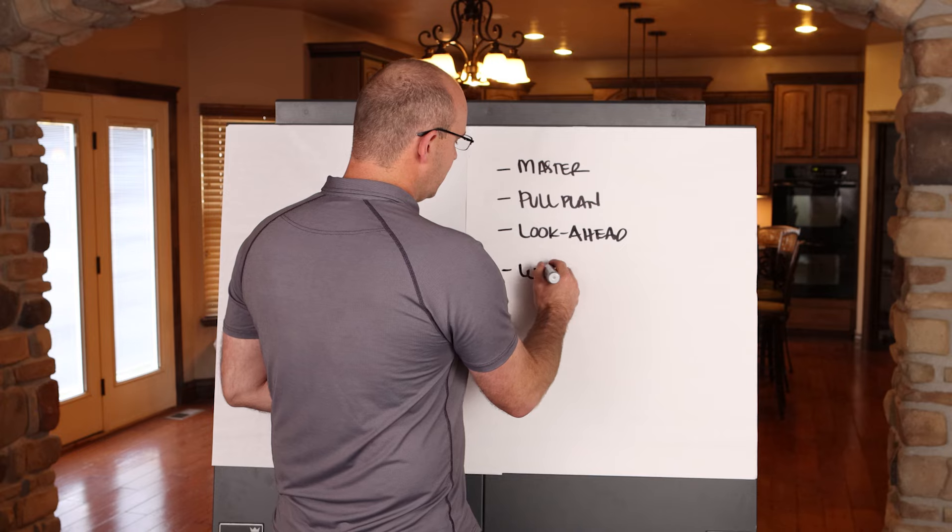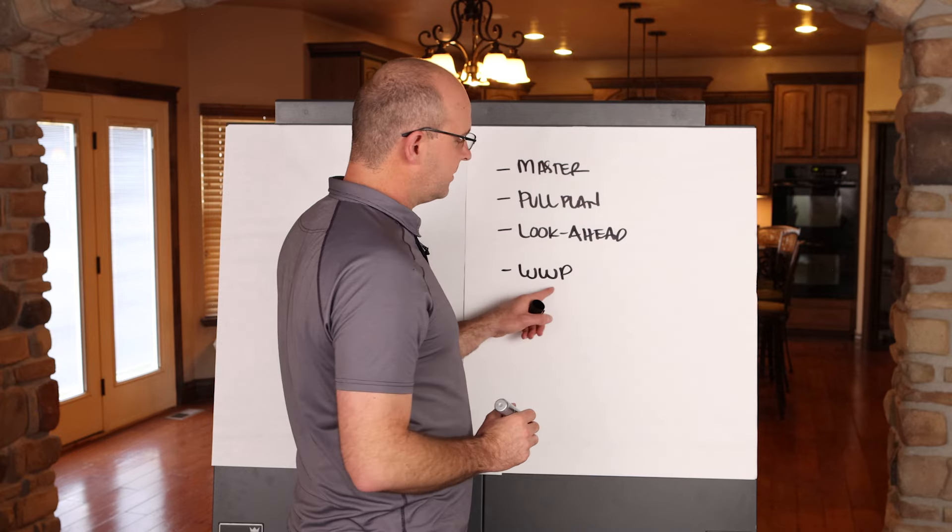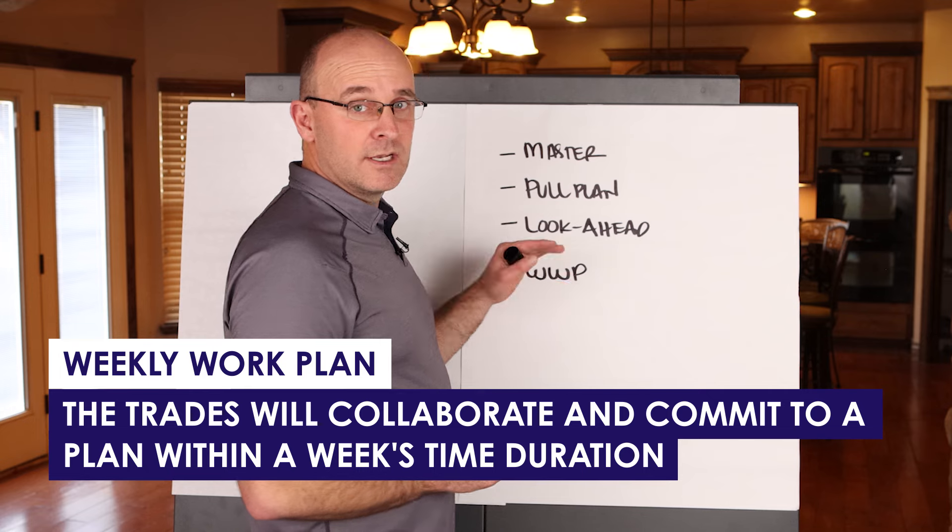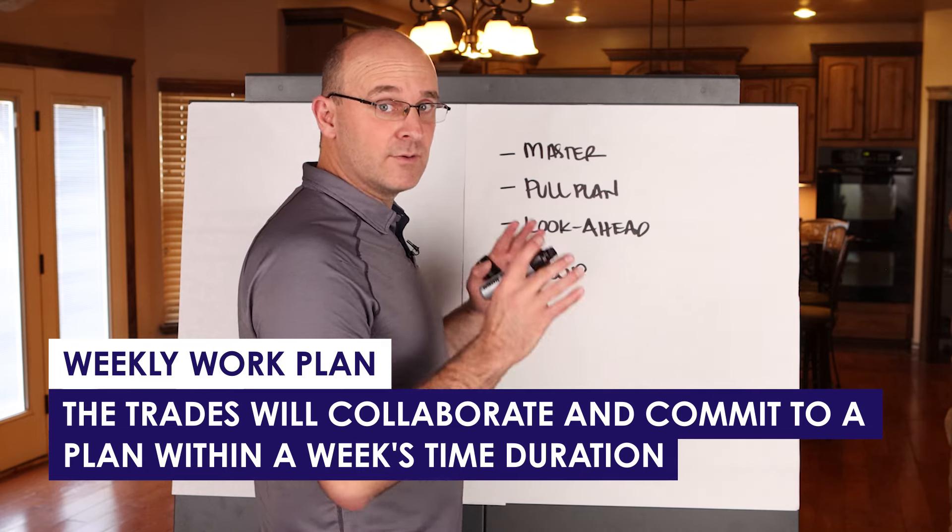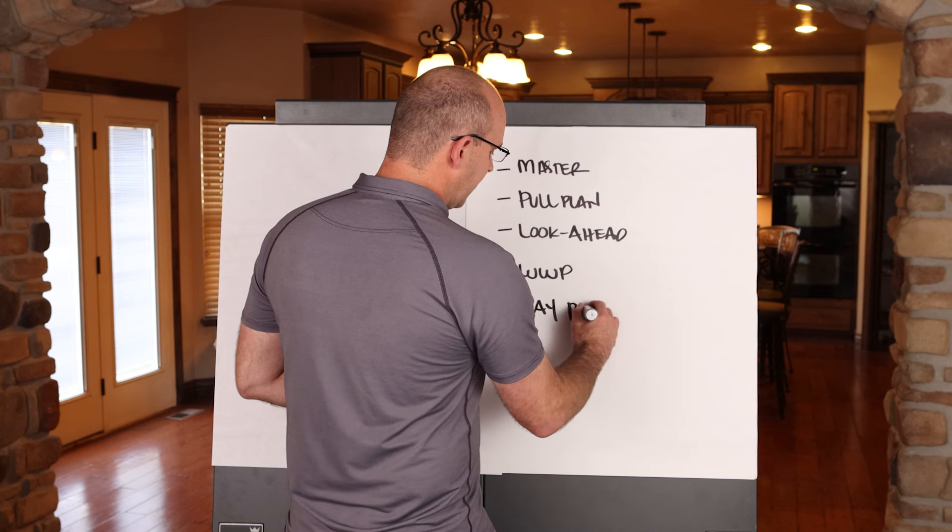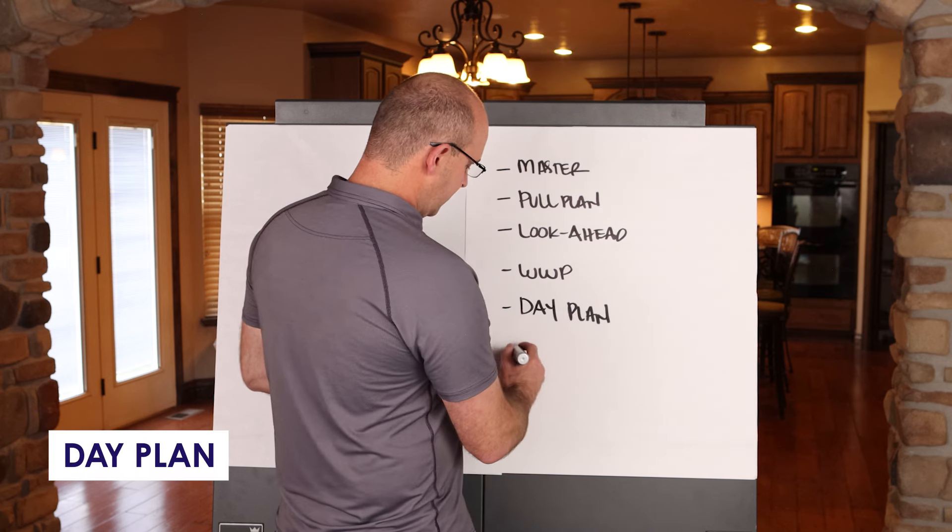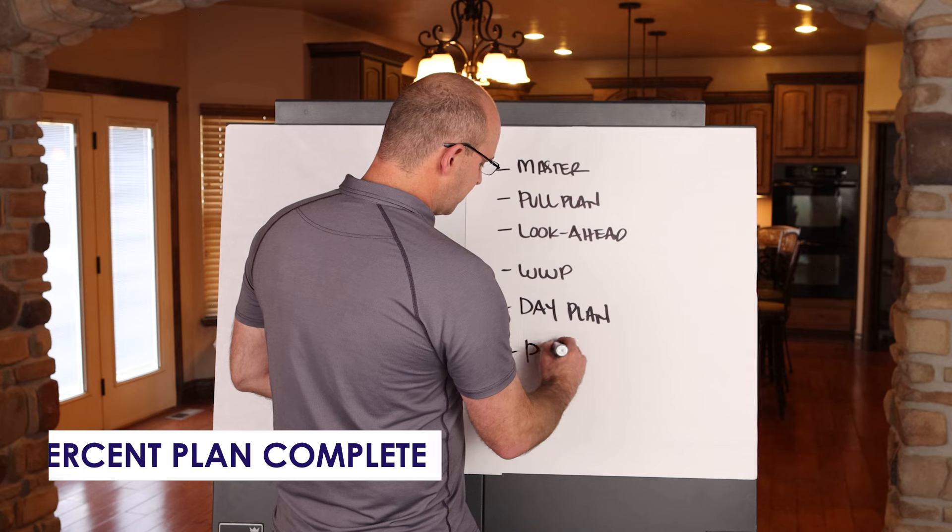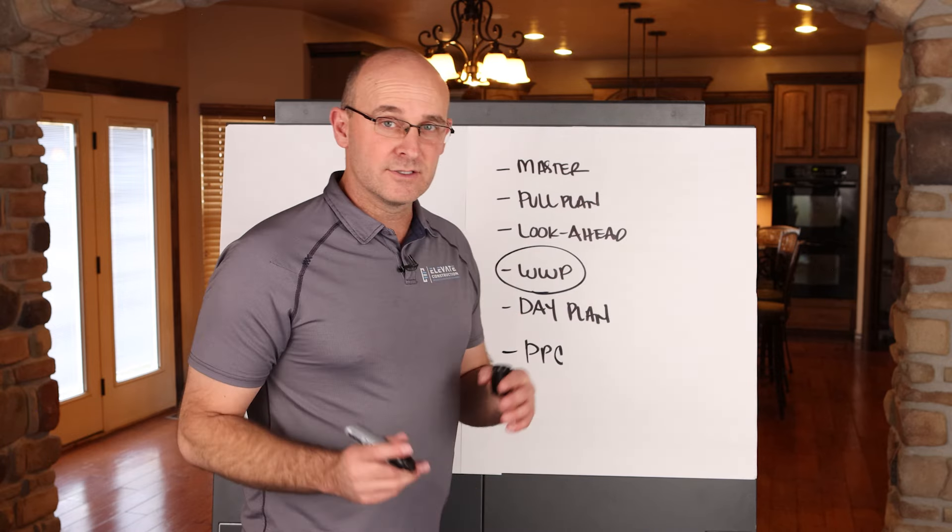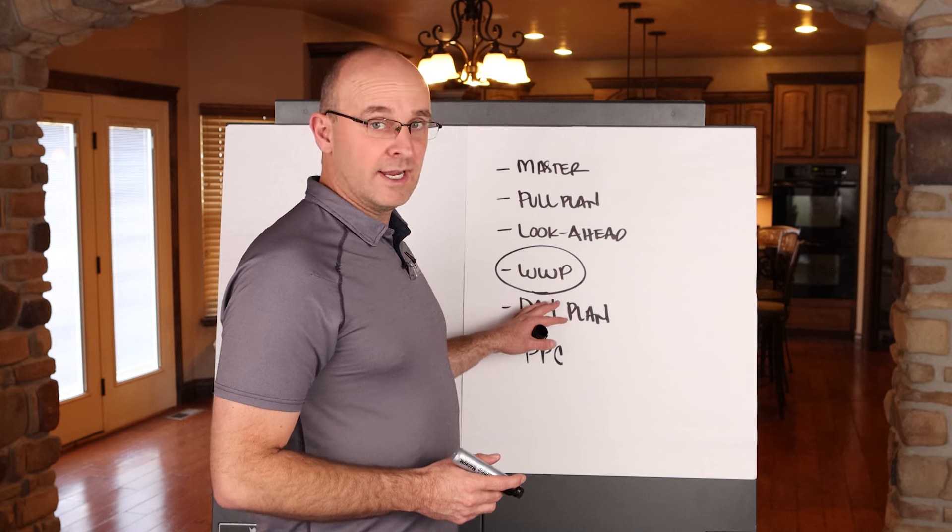And then there is the weekly work plan, which I'll do as WWP to get you used to it. This weekly work plan is where the trades will collaborate and commit to a plan within a week's time duration. And then we have a day plan, and that day plan is specifically for the day. And then we track percent plan complete. So what we're talking about in this video is the weekly work plan.